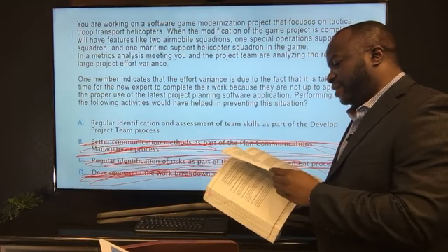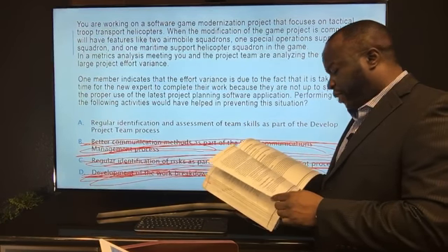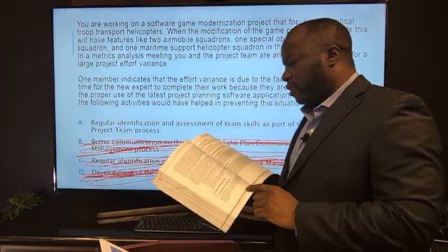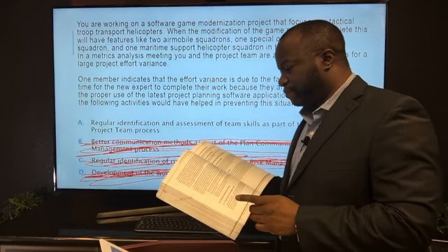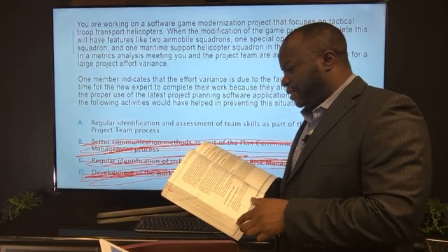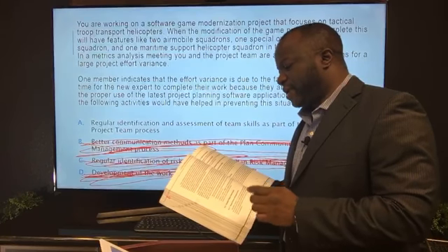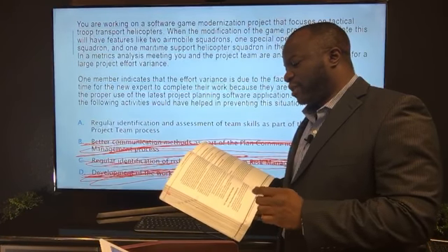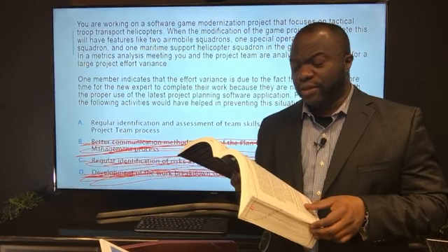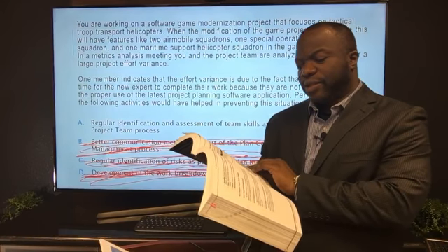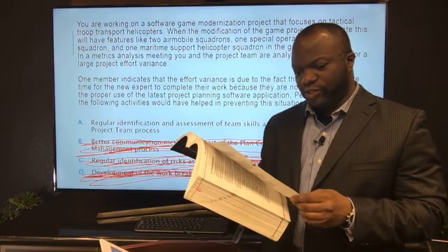Let's go to the second input. Second input, very important. All right. So page 275, it says, project staff assignments described in section 9.2.3.1. Team development starts with a list of project team members. Project staff assignment documents identify the people who are on the team. When we know the assignments, we then know what kind of training or team building will fit these people. So based on that, we go a step further into the training option of a tool and technique used here.